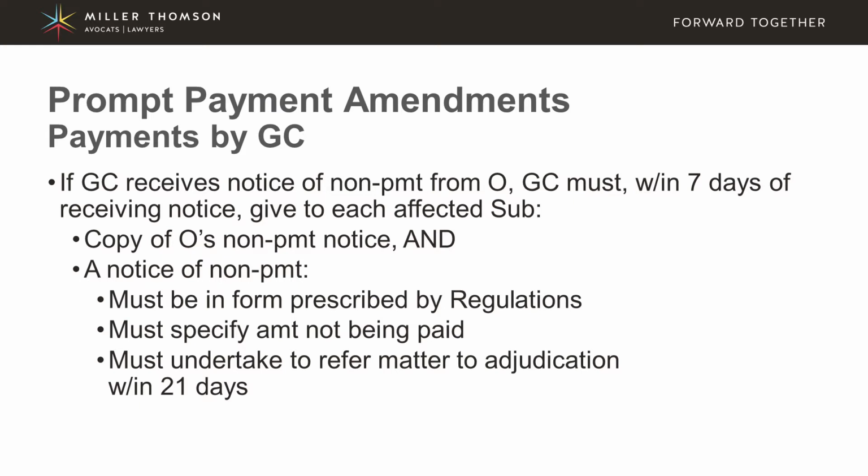It must specify the amount that isn't going to be paid, and the GC must also undertake to refer this matter, this payment dispute, to adjudication within 21 days. We'll speak about adjudication later in the presentation, but just bear in mind that this notice of non-payment has to advise or indicate that this matter will be going to adjudication.